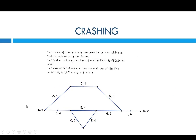The owner of the estate is prepared to pay the additional cost to achieve early completion. The cost of reducing time of each activity is $5,000 per week. The maximum reduction in time for each of the five activities — A, C, E, F, and G — is two weeks. So we can work with C and F, reducing them by two weeks maximum. That means C will become one week and F will become two weeks.